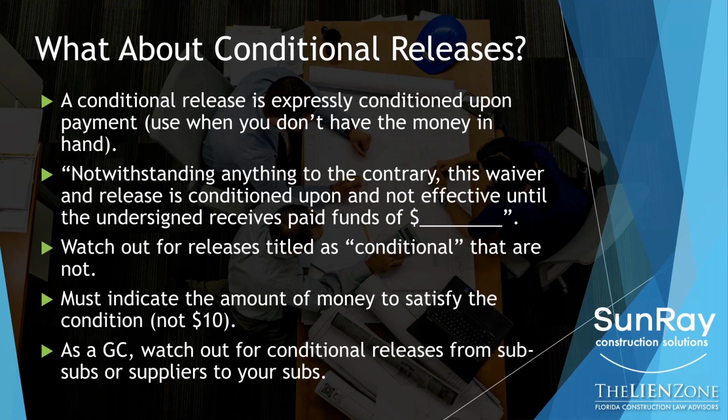So you may find yourself in a position where you've given the money expecting it to get to the supply house. It doesn't get there. You look at your release, it's conditioned, so it has no force and effect in your favor. And now you may have to pay twice.